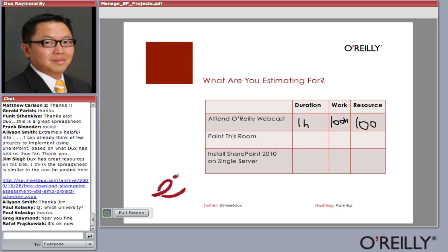Now, what if we had 200 people in here? Will this webcast be shorter? Will it be knocked down to 30 minutes? No, that's absurd. We'll just exert more effort. It'll just be 200 hours being spent attending this webcast.